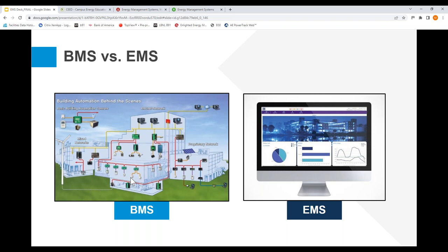So sometimes a little, but sometimes a lot, as far as custom programming for each building that has to occur. And then of course they have to do the startup and kind of troubleshooting. And generally that's kind of when I come into the picture as a commissioning agent. Well, it's not the only time I come in, but this is an important part where we actually do a lot of testing on the equipment. Again, making sure it works and works as intended.